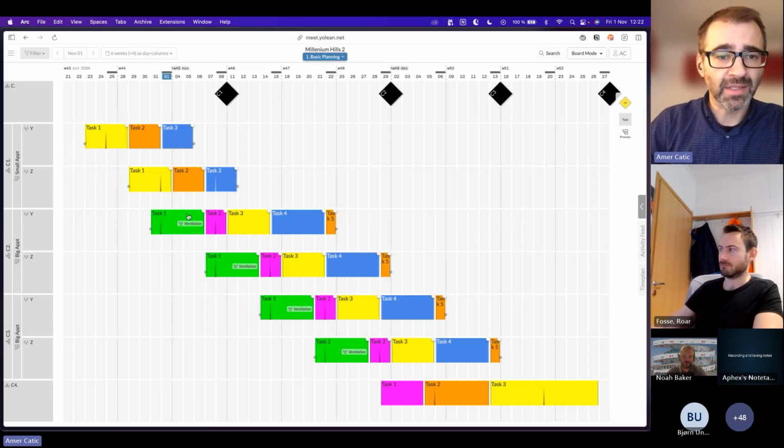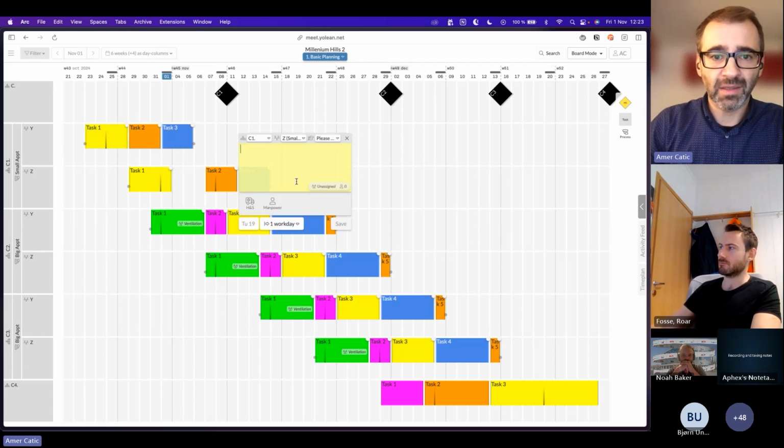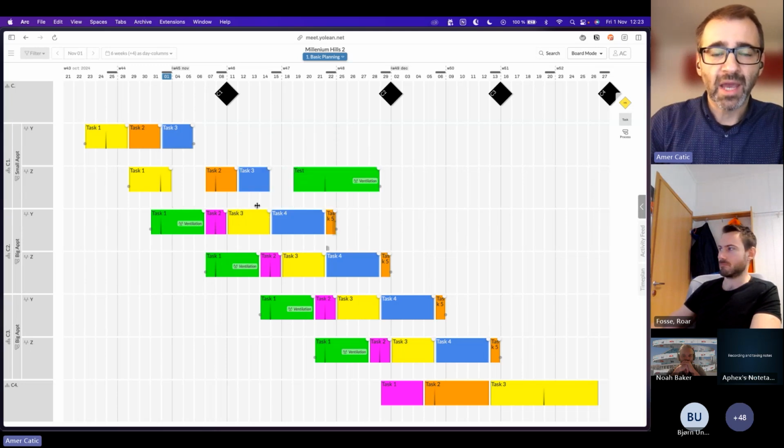And I can also introduce gaps inside a location. So if, on this particular process instance, I need to add a gap, I can do that. Or if I want to add a task here, like so, give ventilation a new task here, and then just extend, I will do it only in this location.